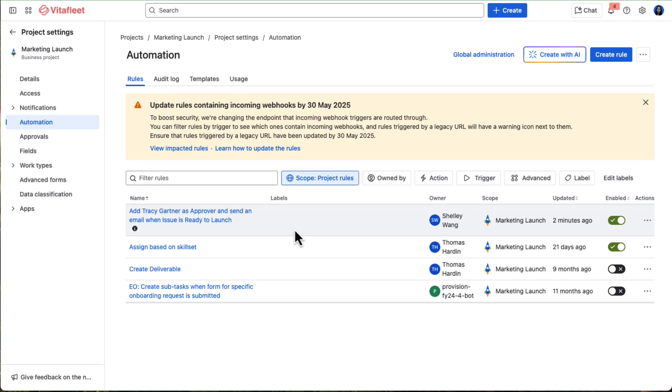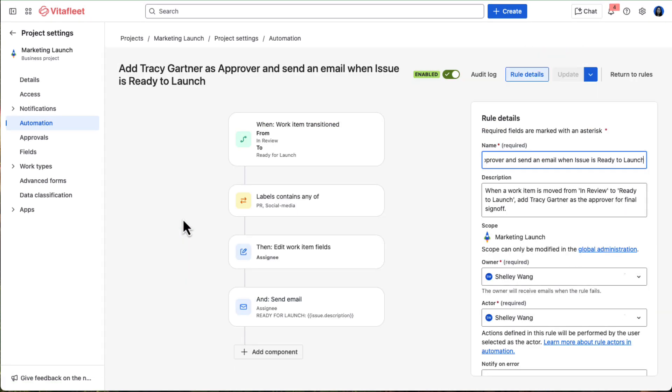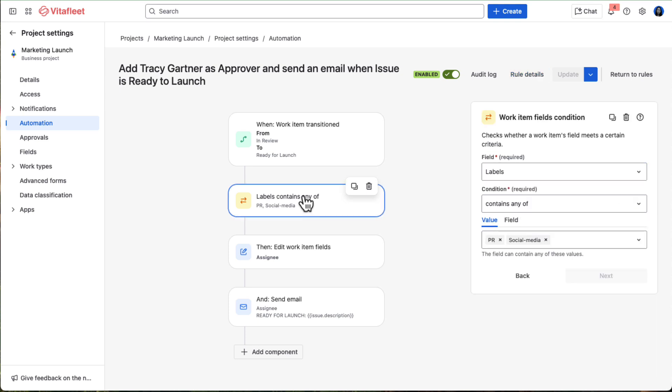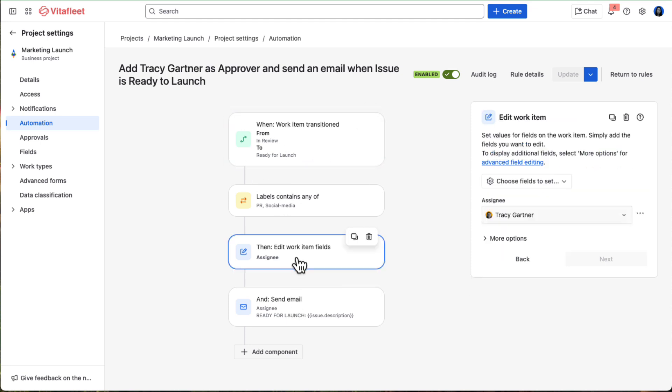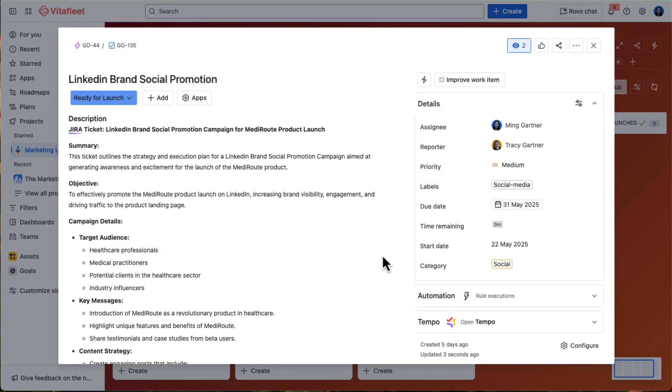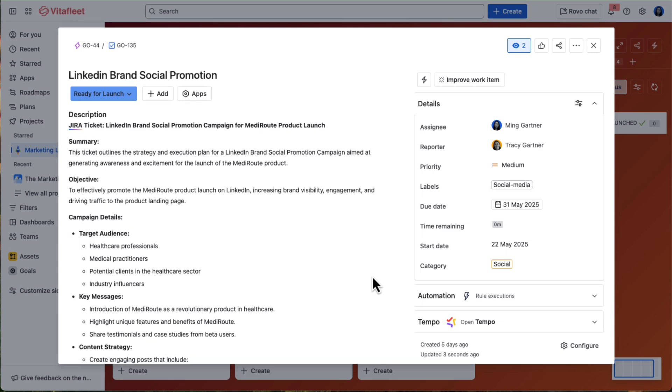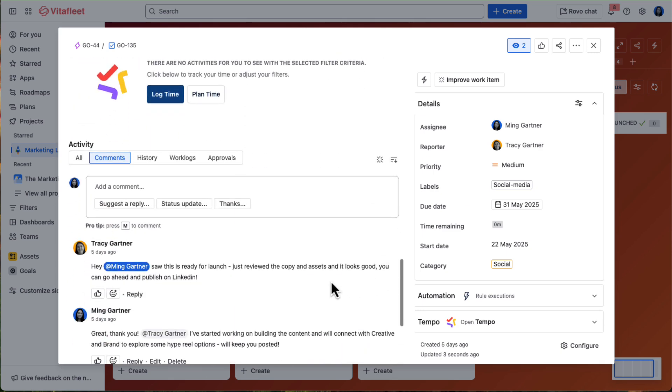For example, Tracy, as a team lead, likes to give social and PR deliverables one last look before they go live. So we set up an automation, when any work labeled social or PR is moved to Ready to Launch, it's automatically reassigned to Tracy, and she gets an email prompt to review it. Once she gives the OK, Ming can go ahead and launch.